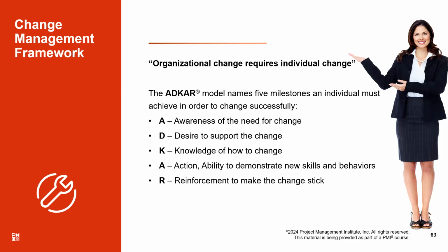But if you do not have many people who are in favor of this change, if there's a majority of people who are not in favor of this change, then probably they will not benefit from the result of the project and they will not like to use the product of the project. Ultimately, the change will again dwindle away. So this is one very important step to make the change stick.